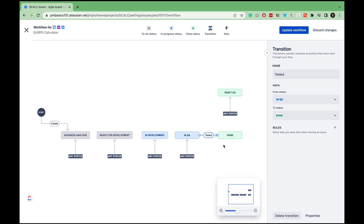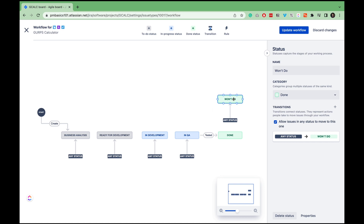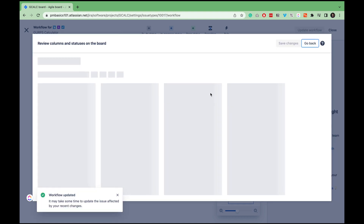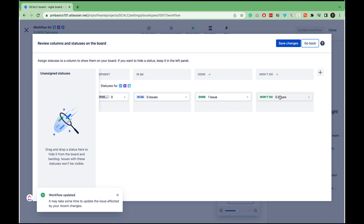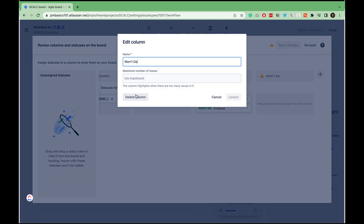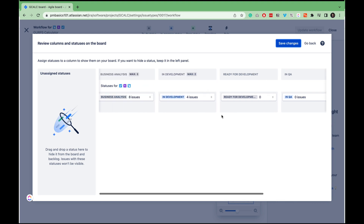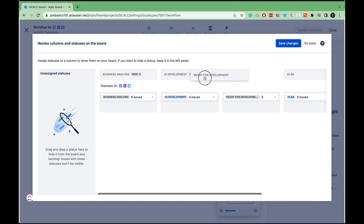Only QA engineers have the authority to sign off a ticket as done. On the other hand, we may decide that we won't do a ticket — that's why I've added the won't do status, and there are no restrictions on this transition. Now we need to map these statuses to the columns, which finalizes our workflow setup. It's quite straightforward — just don't forget to move the columns around. If you watched this video so far, it's a great moment to hit the like button. Do it right now because it will help me reach more project managers who need this information.